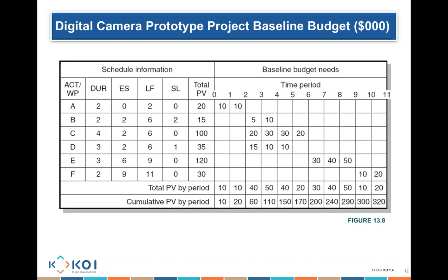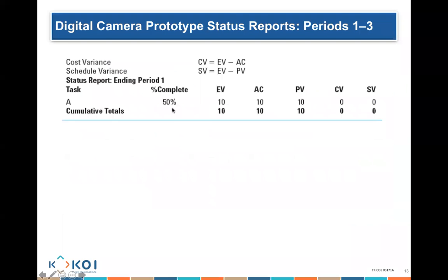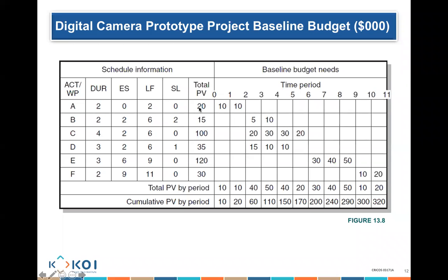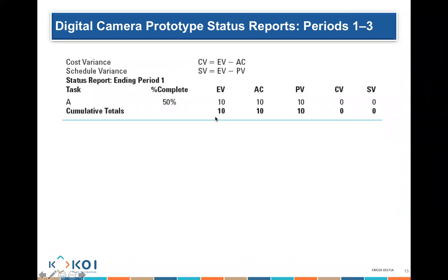When you start doing the job, you start looking at task A. Say, okay, I completed today 50% of task A. So you double click on the task and you say 50% complete. So 50% out of what? 50% out of your plan. That's how you know how much you've earned. 50% out of what I was planned to go and complete. So if you see here, 50% I finished, that's 50% of 20. So I finished 10 worth of work. Does that make sense?